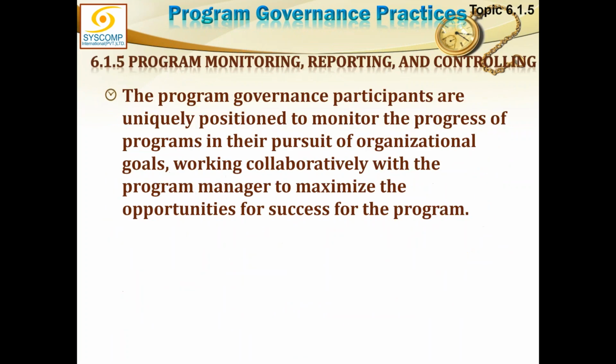So, what is the role of a project manager in program governance? You see, the project manager will have to develop a project management plan. Project manager will need a project governance framework. The project governance framework will be a subset of, or will be inherited from, the program management plan, which ultimately comes out of the program governance plan.